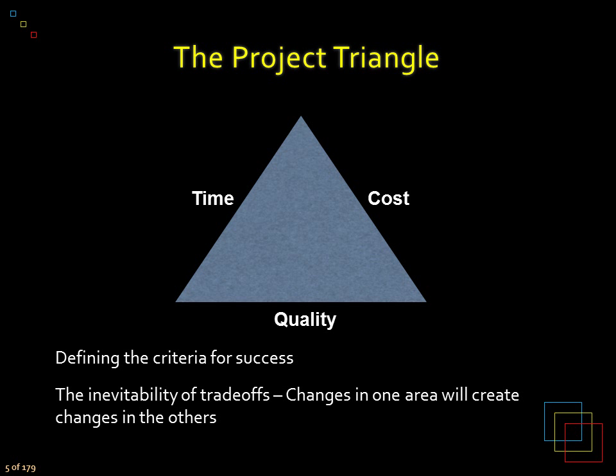If you want it done with high quality and you want it done soon, then the cost is going to go way up. If you want it done cheap and with high quality, then it'll just take a really long time because we can't pay for additional resources to help on the project. And yes, this is probably on the test.